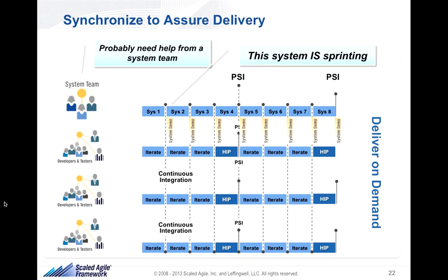And so these teams are aligned. And we align them for a number of reasons, not the least of which is that we can do system continuous integration. If you go into your large client base, or maybe internal IBM, and you say, do you have continuous integration? The answer is probably yeah. But if you say at the system level, well, what do you mean by that? I mean every 2 weeks, can you demo all the new code end-to-end that's been developed by every team on that program in every system, component, and subsystem?